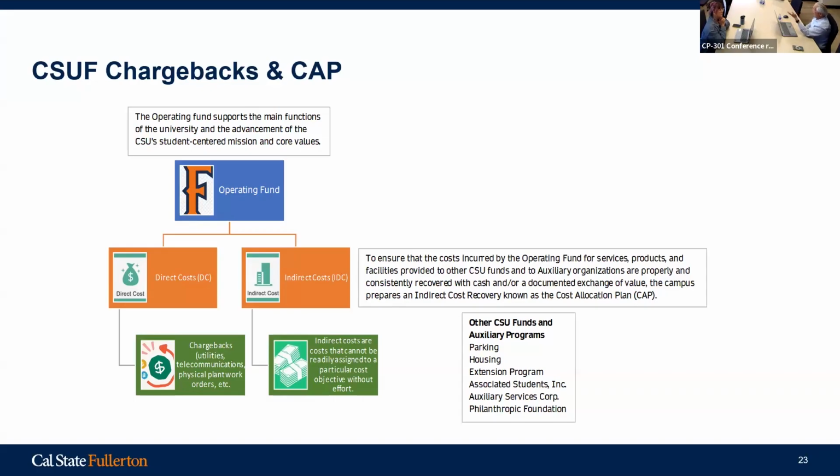When your department, it can be any department, the president's office, requests some services and they provide that, they deploy the trades and they know who they are, and that becomes a direct cost to the specific project. And then they add all the material supplies they consume, and that also is billable. And then comes the overhead, the supervisor time that we allocate, and then the executive director time, and so on and so forth.